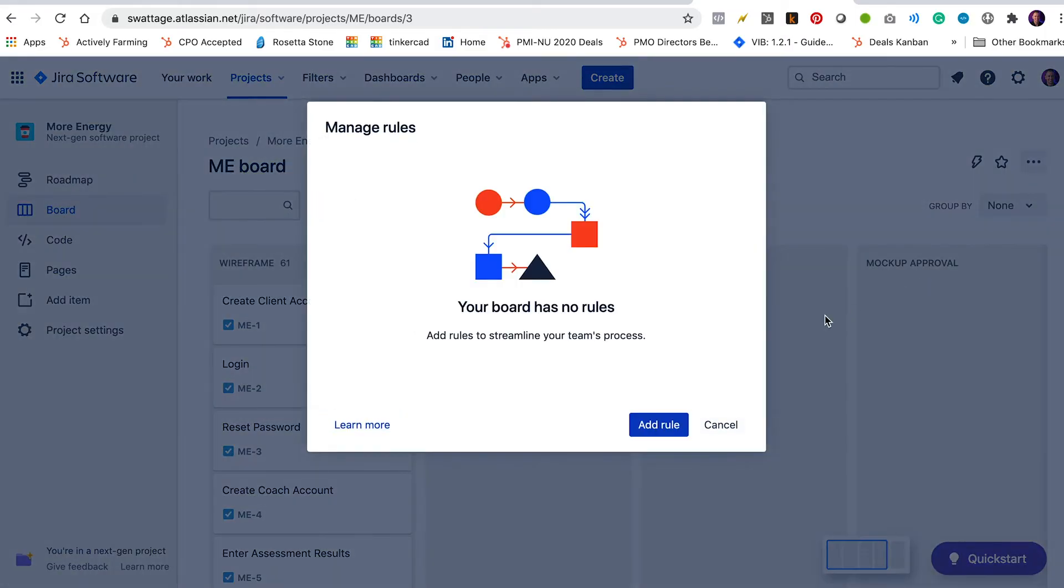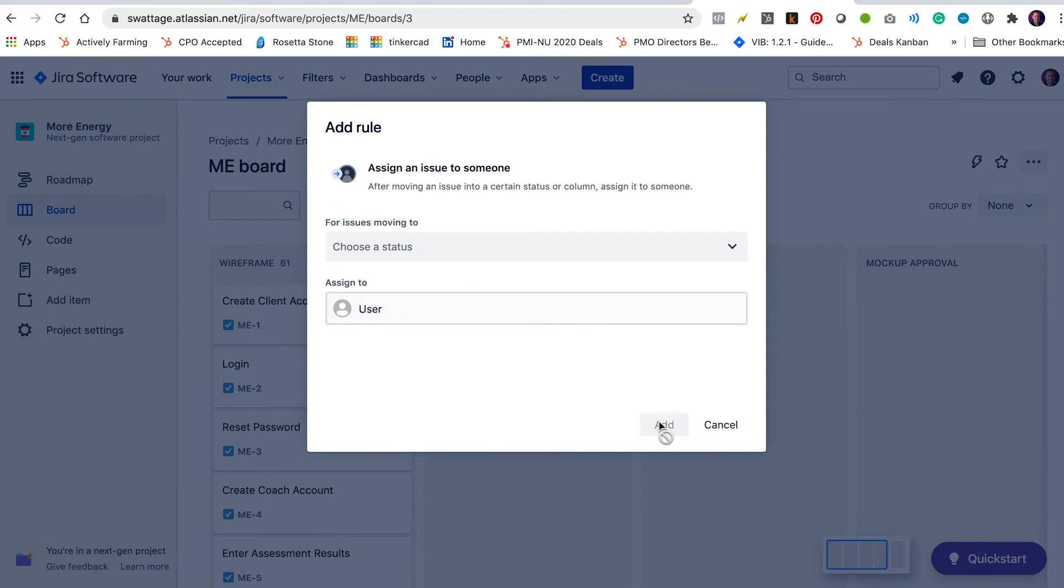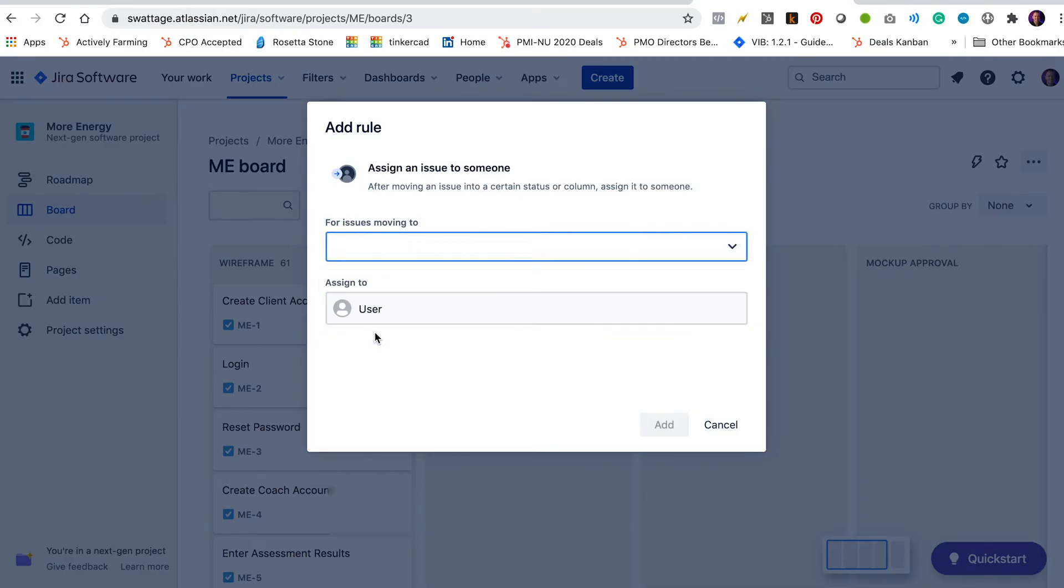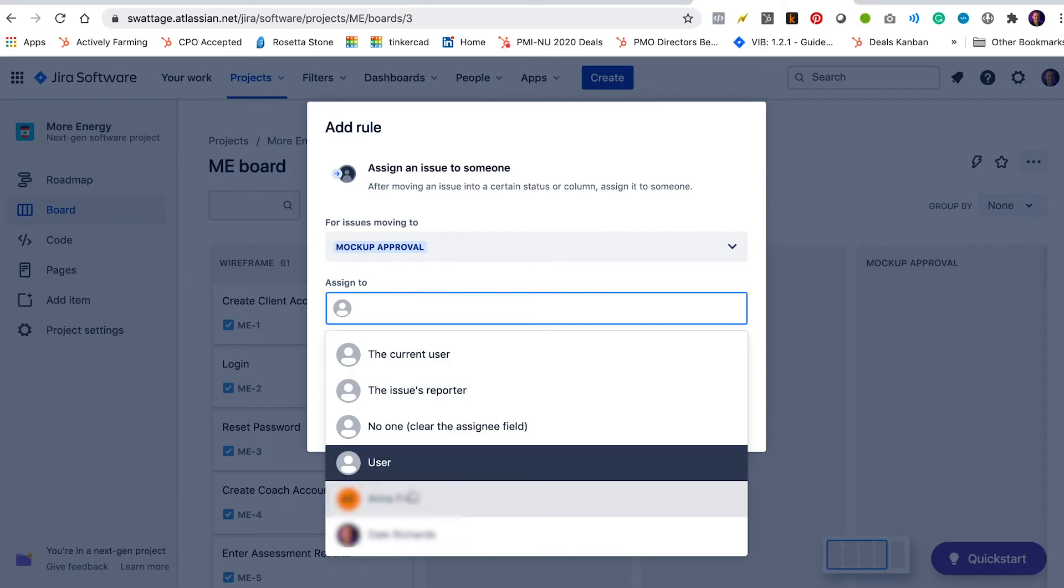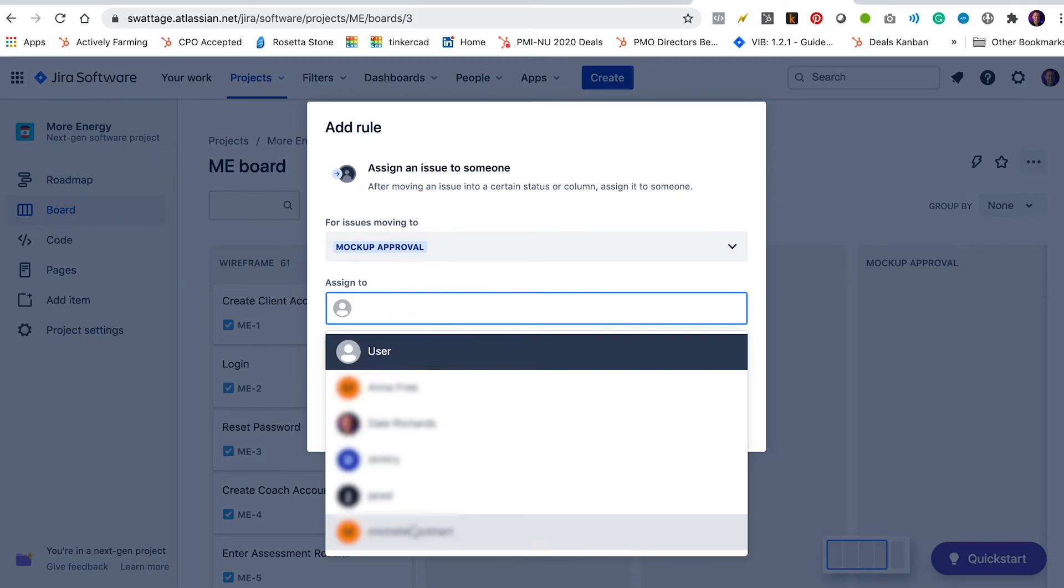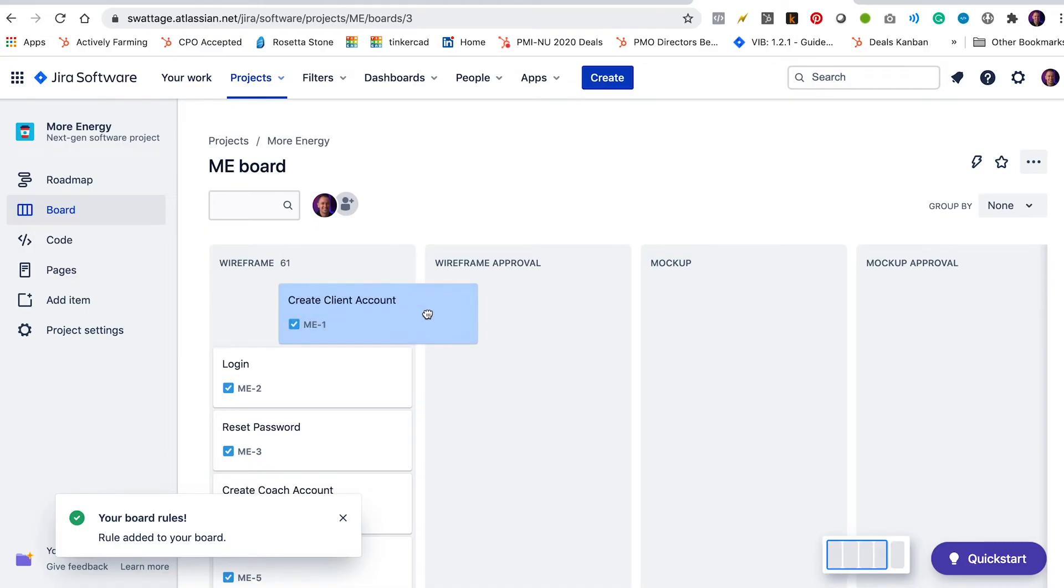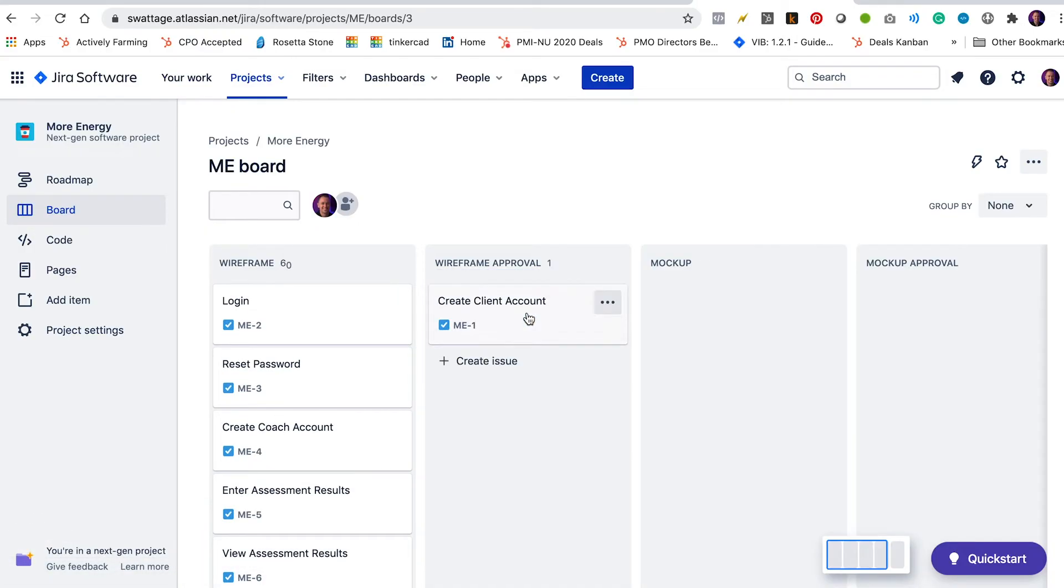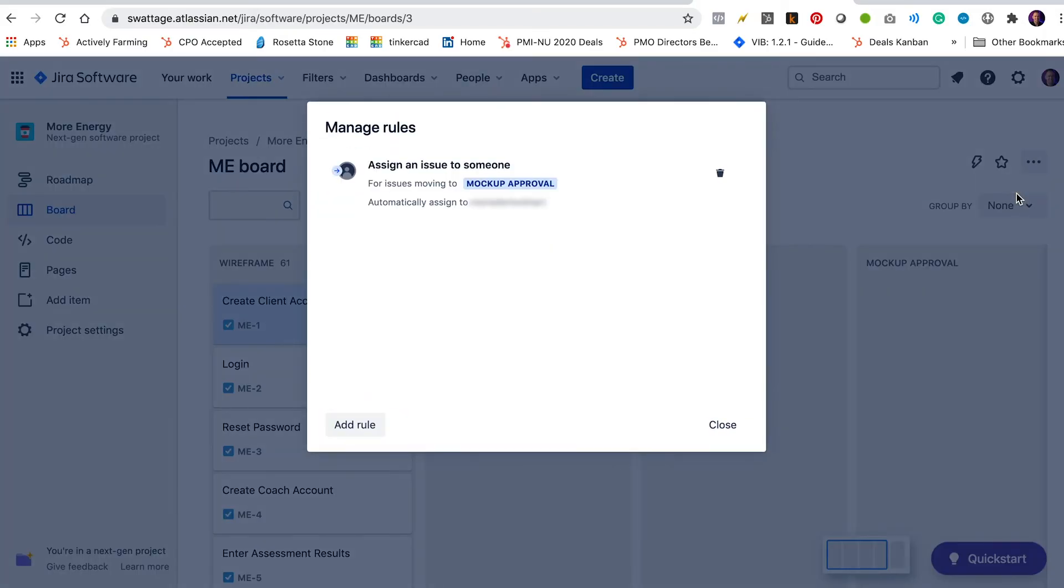Manage rules. Your board has no rules. So I'm going to click add a rule. We're going to select assign an issue to someone. So for issues moving to mockup approval, we want to assign it to Michelle. That way, as soon as Dimitri moves his first issue from wireframe to wireframe approval, it'll be assigned to Michelle. Let's go ahead and add the other rules as well.